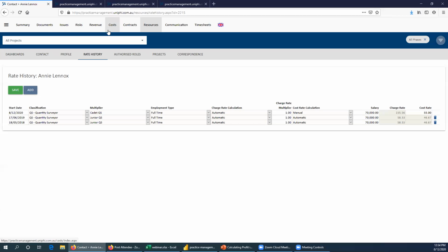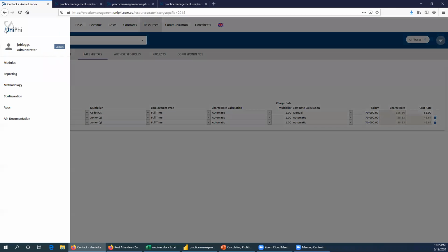That's the main way that these are being used, but equally we have property developers, and we have subcontractors and contractors who are really not wanting to worry too much. Most of the cost in their project is purchased items, and the issue around resource time is small. They have a small number of internal people on the project, large numbers of external people that they're paying through purchase orders and the like. And so that's where you want the resource rates thing to be pretty much moot, and you just want all of the costs to be coming from your charts of accounts.